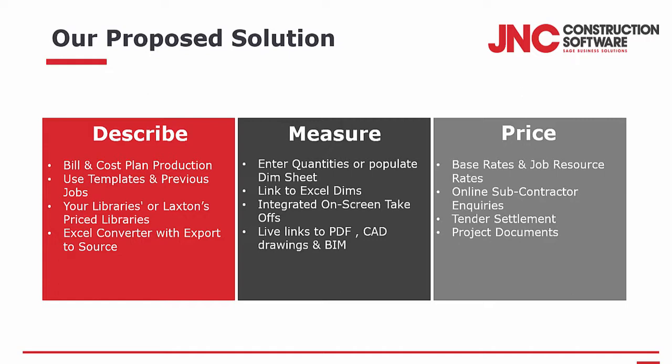Describing is about producing your bill of quantities, your cost plans, using templates and previous jobs, your own libraries or Laxton's libraries. We have the SMM7 and NRM2 Laxton's library available within the Evaluate solution, with the item lines coming fully built up. You're also able to import an Excel bill of quantity to price using your libraries and then export back out in the same format it was sent to you in.